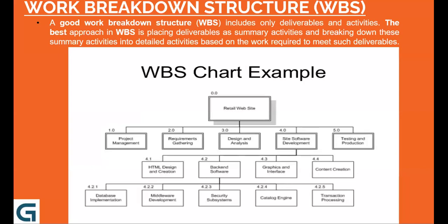So hypothetically, if we want to detail it further, take client meetings can be 2.1. Prepare flow diagram can be 2.2. Flow diagram and BRD. Okay, then third is give feedback of testing, that can be 2.3. Same way, all the employees who are working on a project are covered under the WBS. Make sense, guys?